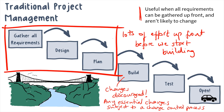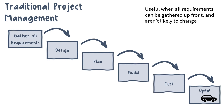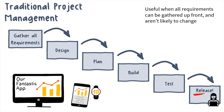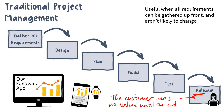Let's imagine now that this is a software development project. I'm going to keep those different stages of the waterfall but change the final one to 'releasing to end users.' So let's imagine we're developing a groundbreaking new language learning app to be used on a browser, on a phone, or maybe even on a smartwatch. I'm immediately seeing a problem with using a waterfall or predictive plan-based approach here, because the customer is not going to see any deliverable at all until the app is completely finished with all its bells and whistles — all of the features decided on at the beginning. They won't see any value until two years or so after the idea was first born.